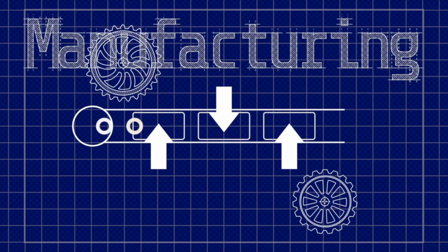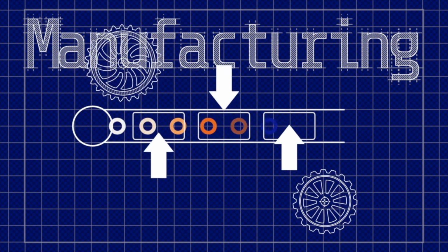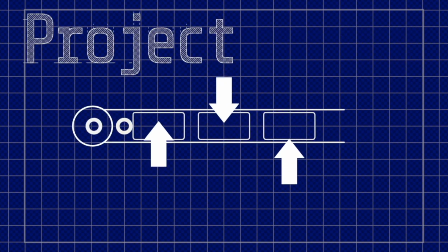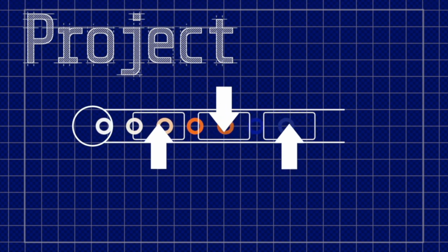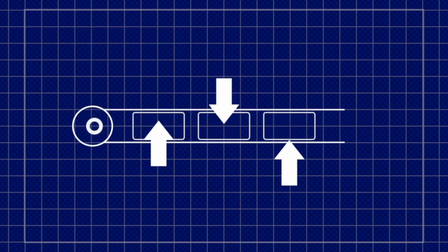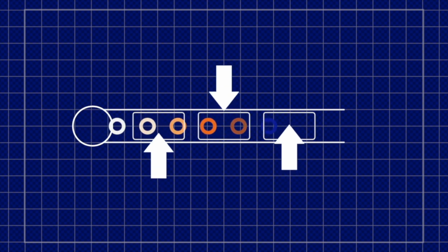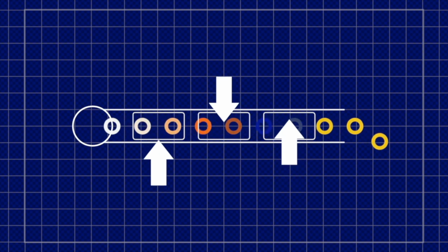Well, if you think about manufacturing, raw materials go into a pipeline. A series of processes take place and a finished product comes out the end. Now let's look at a project. Some requirements go into a pipeline. A series of processes take place and a finished deliverable comes out of the end. What Kanban does is make the position of each requirement in the pipeline very clear. And if some are getting stuck and there's a bottleneck, the project manager can easily spot it, and then they can deploy resources to address the issue.